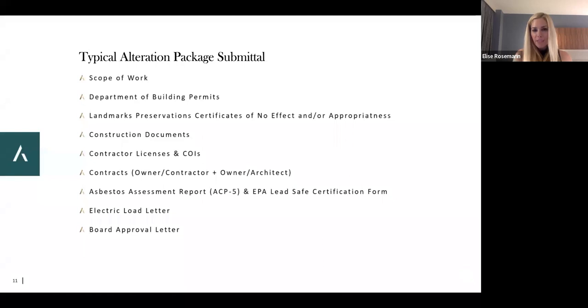Chris, we've been seeing some false COIs lately, right? We have. In fact, we've had contractors who may fall into the bucket that you were just mentioning who aren't necessarily above board, and they have tried to submit fraudulent COIs that were essentially made up, and we've been able to catch them because we have our own in-house risk manager. I think it's also interesting to make sure that you see the policy of your contractor, not just the COI, because there could be exceptions in the policy that aren't reflected in the COI, right? They might say, oh, we can do this type of work, but not if you're next to a dry cleaner, or there's all kinds of weird rules and regulations and you want to make sure that they align.